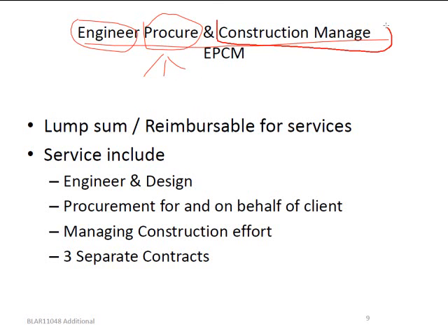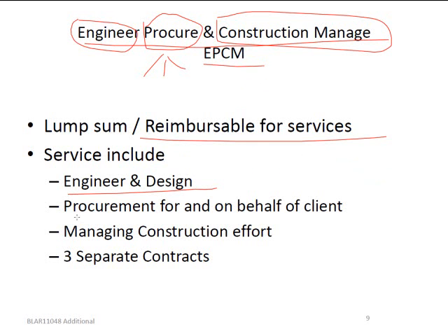And over here, this is a construction management function. So the EPCM contractor is not going to do any physical work on site. Typically this is going to be reimbursable because the EPCM contractor is a manager. He sells hours to the employer. So what does it include? Engineering and design, procurement for and on behalf of, and then of course the management of the construction effort.